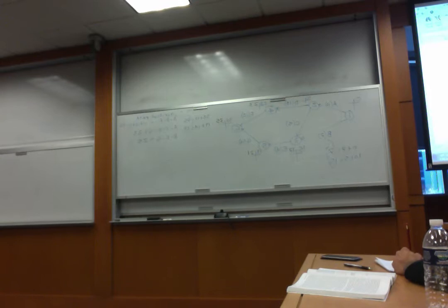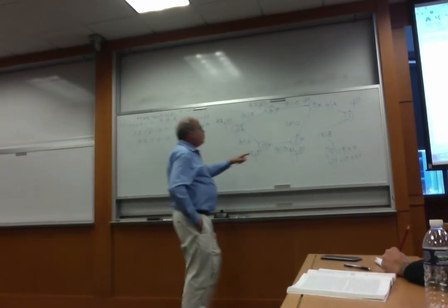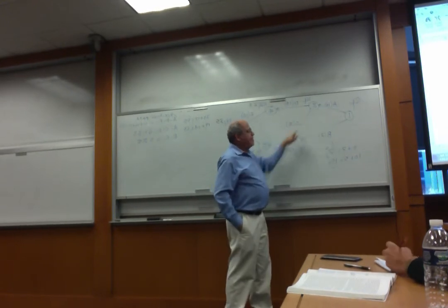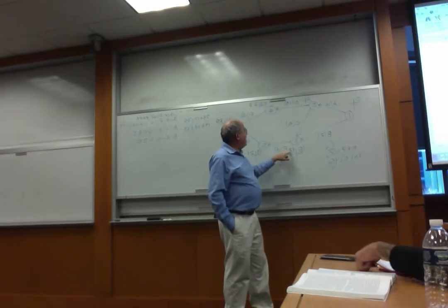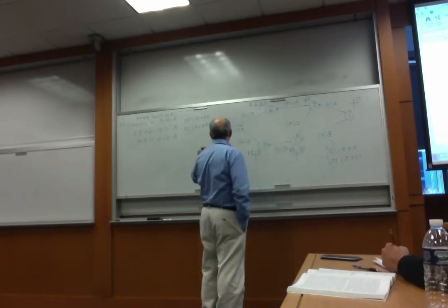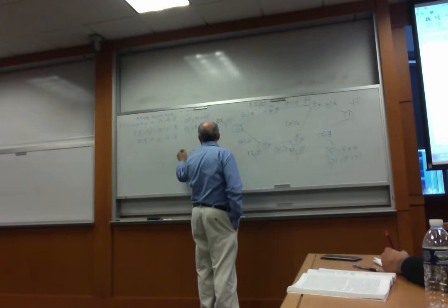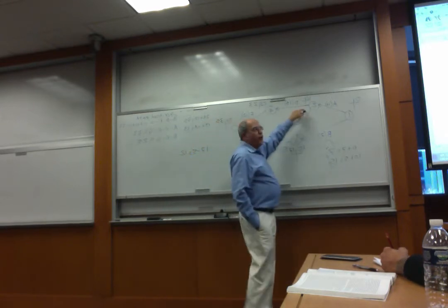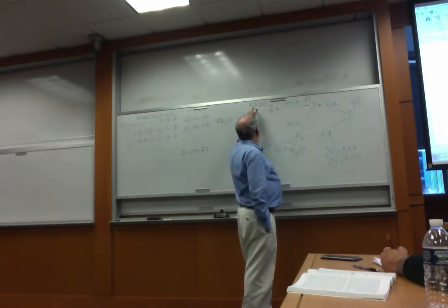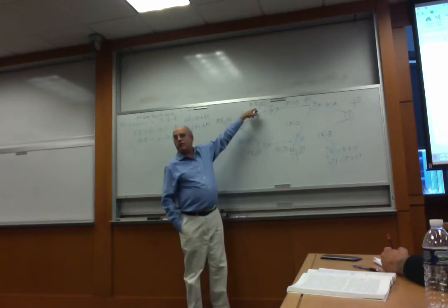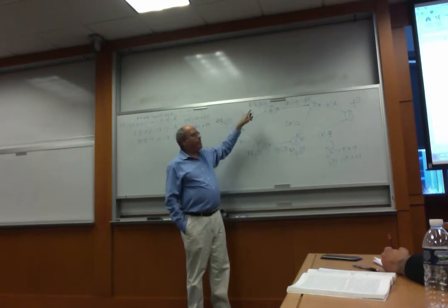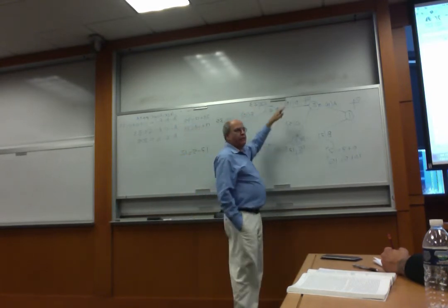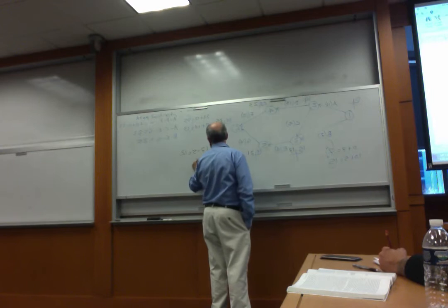Since we're doing everything in reverse, how can we get to 2 going backwards? We can get to 2 from 3. Look at this link. Going backwards from 3 to 2, the value will be 17 minus 5, which is 12. But we can also get to 2 going backwards from 4. So the value is 23, but be careful. Which 23? The black 23. It's only the black numbers now, the ones on the right. The black 23, 23 minus 13, which is 10.